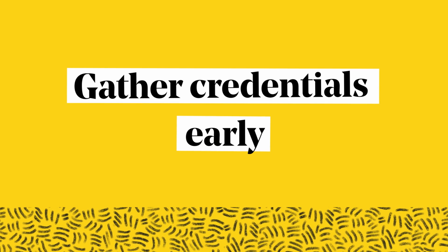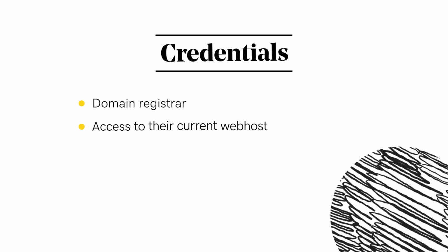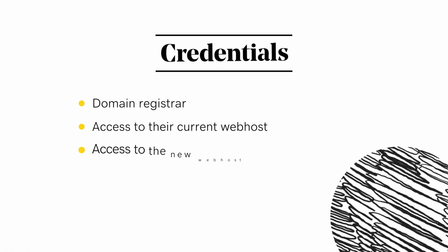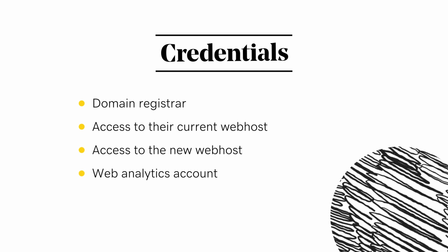Make sure your onboarding process for your new client includes immediately gathering their credentials. This includes the domain registrar, access to their current web host, access to the new web host, web analytics account, and CDN access if they are using one. These credentials should be tested immediately to make sure you have access, letting the client know not to change any passwords until you've launched the new website.